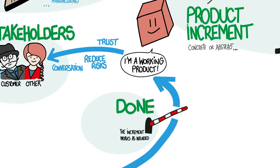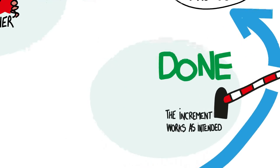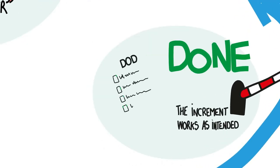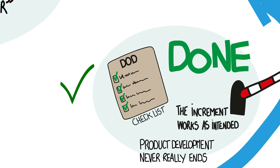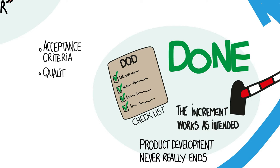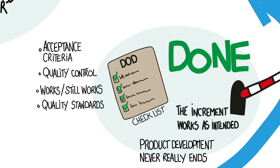Done is a quality gate. Nothing enters the product increment unless it is done. Every scrum team has a definition of done, and it is applied to every feature and every increment. The definition of done does not address whether the product is complete or finished — as long as a product is viable, its development usually never really ends. The definition of done is often a simple checklist that covers both acceptance criteria and quality control, ensuring that features from previous sprints still work and that the team maintains its quality standards.